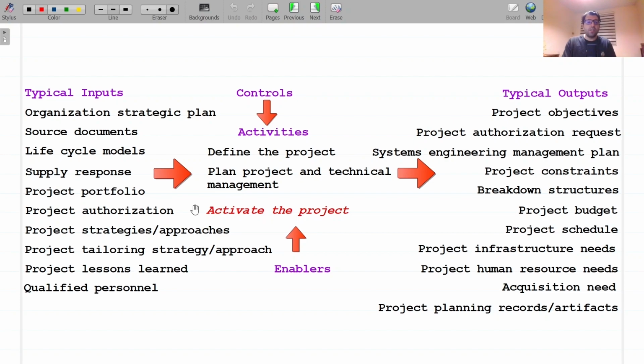Agile project management methods also include planning. The cycles may be shorter and more frequent, but planning is an essential process. Agile planning process is not related to the entire project but addressing only the next already known iterations while applying learning from the previous iterations.